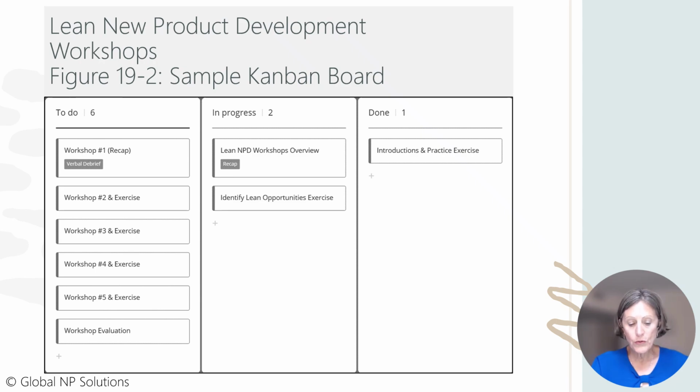Note that Scrum boards and Kanban boards are complementary tools. Many lean new product development teams combine specific features of the two to better visualize and manage their work. The burn down chart is an element of a Scrum board that is often translated to lean new product development. Burn down chart. An example of a burn down chart was shown in figure 9-7 and discussed for both Scrum and Wagile product development. In Scrum, the y-axis of the burn down chart shows the number of story points for completion during a given sprint, while the sprint duration is shown on the x-axis.